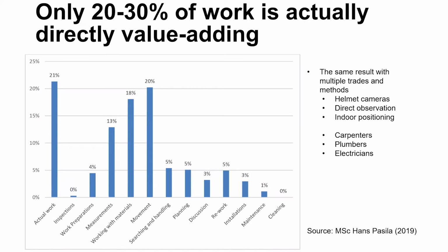All of these 3 big segments that are not actual work-related time could be solved with a real-time situation picture, real-time construction monitoring. We have done the same research with many different methods, for example, indoor positioning and direct observation of people, so-called time and motion studies, and we have analyzed carpenters, plumbers, and electricians. With all the trades and all the methods, we get a very low value-adding percentage.